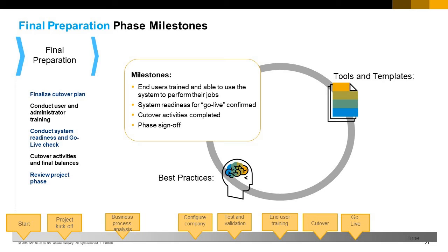Cutover activities completed before the switch to production. The cutover period happens just before go-live, when many activities must take place in the correct sequence and in a very short time frame, so that the new system can fully run the production workload. Activities include freezing the legacy system, migrating last-minute master data, final item quantities from stock count, open transactions such as purchase and sales orders, and balance sheet accounts. See the opening balances topic in this training for more details.